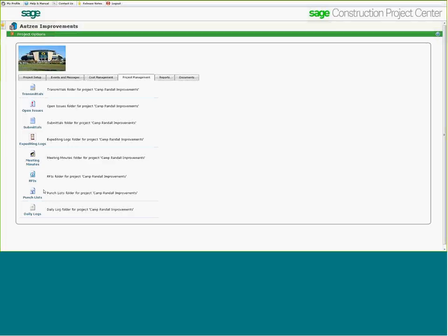We can track punch list items as well, where you can say, here we've got an electrical panel issue, or here we need to move a wall socket over. We can see the painters and electricians and the drywall guy, and everyone can punch off as they do their work. And we have punch lists for architect, subcontractor, owner, anyone you want to make sure is punching these off.